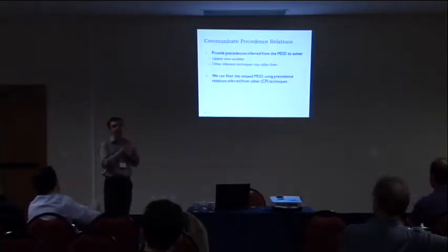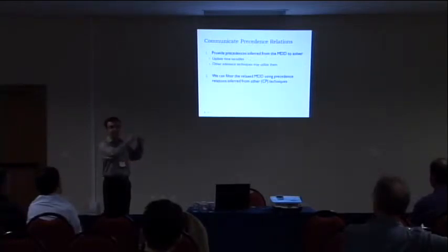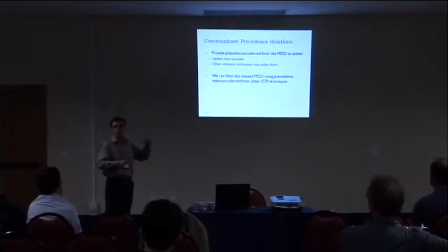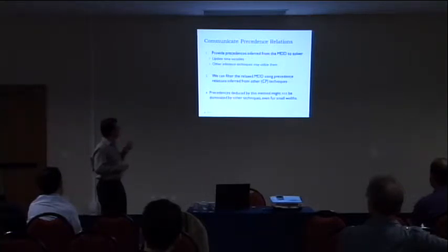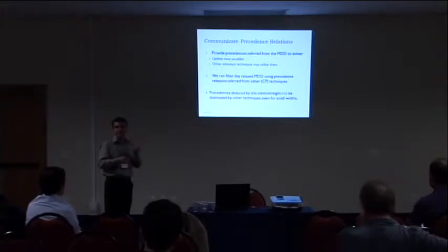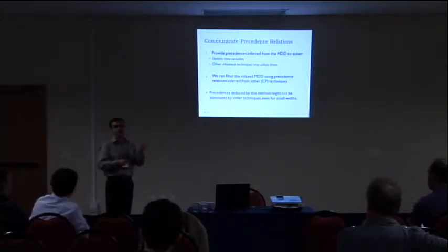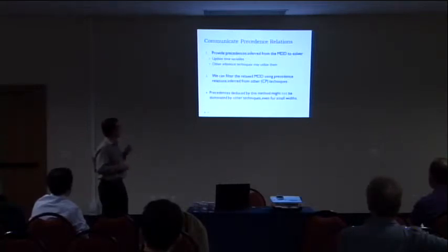If you know that an activity i has to precede j, and if you have a node with the state that j is preceding i, then you can remove that node, because the node is not going to be feasible in your relaxed MDD. And the interesting thing is that we have examples where, even when you consider small widths, the precedence that you deduce using MDDs is not dominated by other techniques, in the sense that the other techniques might not deduce the same precedence. So it's adding to the current framework, it's not being dominated.